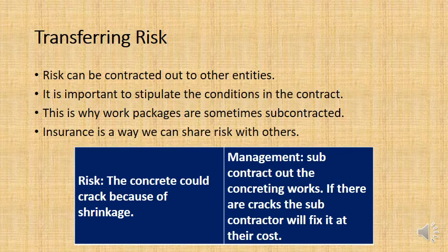This is where you're not transferring a work package, but solely the risk of a work package. So if there are delays because of an earthquake, you can have insurance to cover you for the cost of an earthquake, for example. I'll show you in a slide coming up how insurance works.